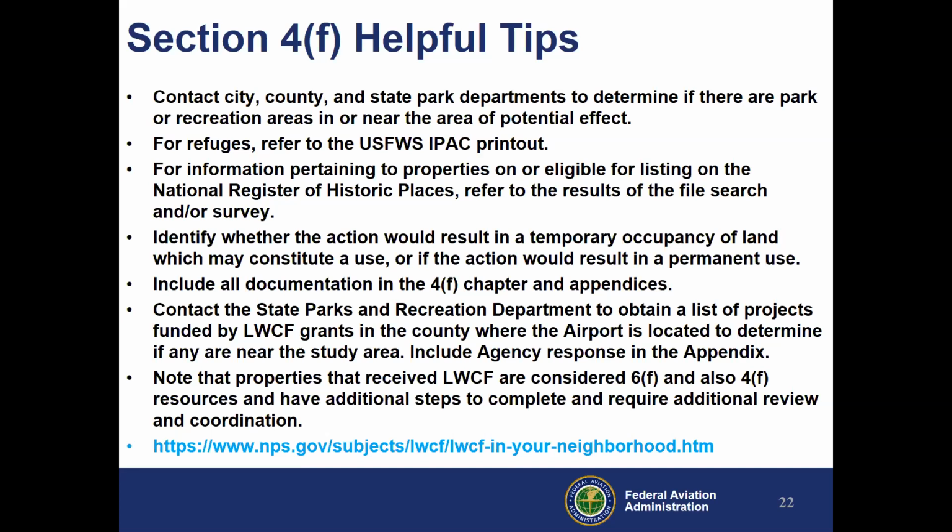Pertaining to historic properties, you can look at your file search that was prepared when you had your cultural resource survey completed. And you determine whether or not a temporary occupancy will constitute use, or if not, would it result in a permanent use? You have to determine that and put that in your environmental document. All documentation should be included in a chapter in the environmental document that's specific to section 4F and its appendices.